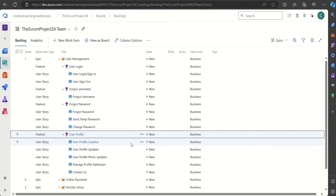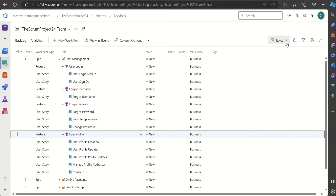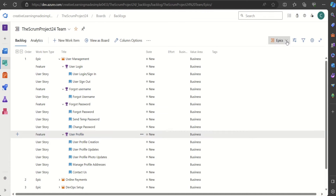This is the hierarchy I'm using in this project. At the top we have Epic, then Epic consists of Features which the end users or customers are going to use, and then we have Features getting realized or implemented through a set of User Stories.